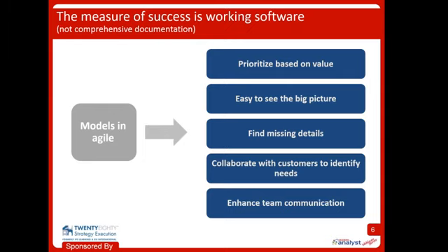There are models like the business objectives model. There's one called objective chains that help us not only determine if something's a high priority or a low priority, but it'll actually help us stack rank features or user stories against one another, so we always know what is the next most important thing to develop.